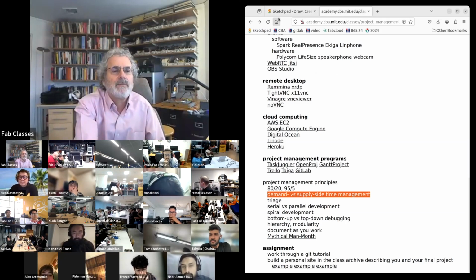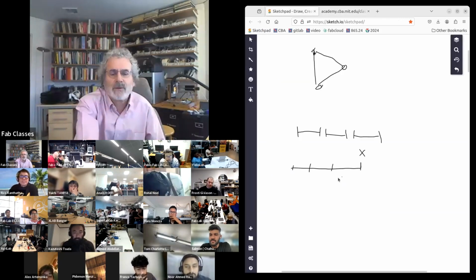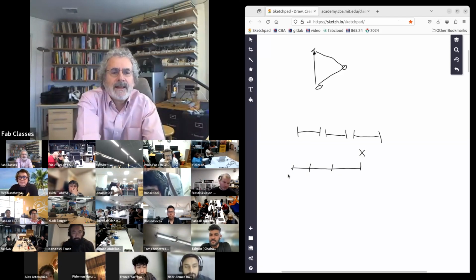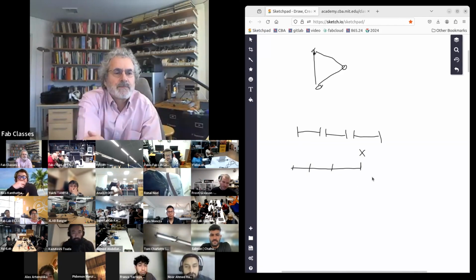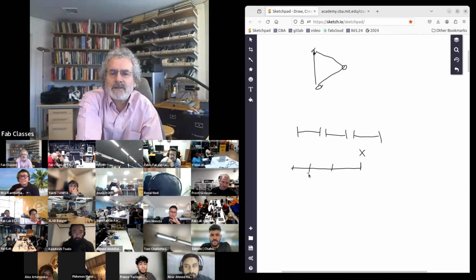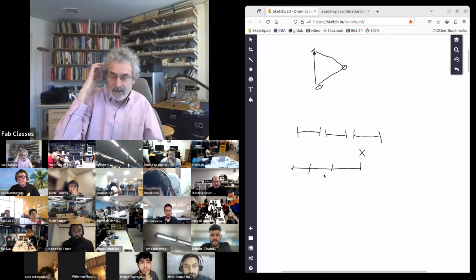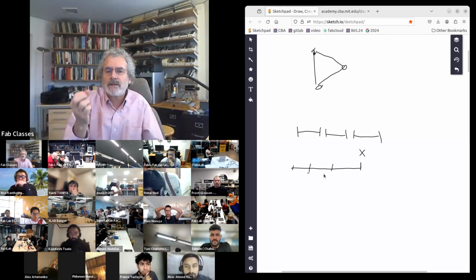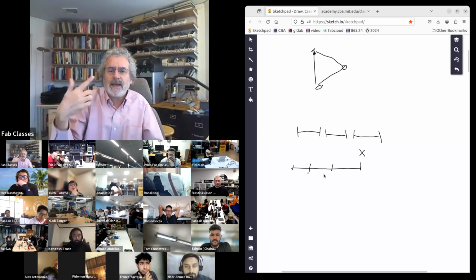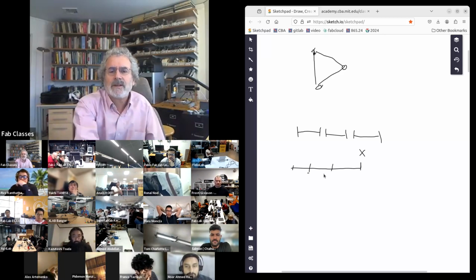Supply side time is you make a schedule of the week. So here we are today. Next Wednesday is the class. And so you can afford, say, a day to do the Git tutorial. You can afford a day to practice with Git. Maybe on the third day, you start learning HTML. The day after that, you start building your website.